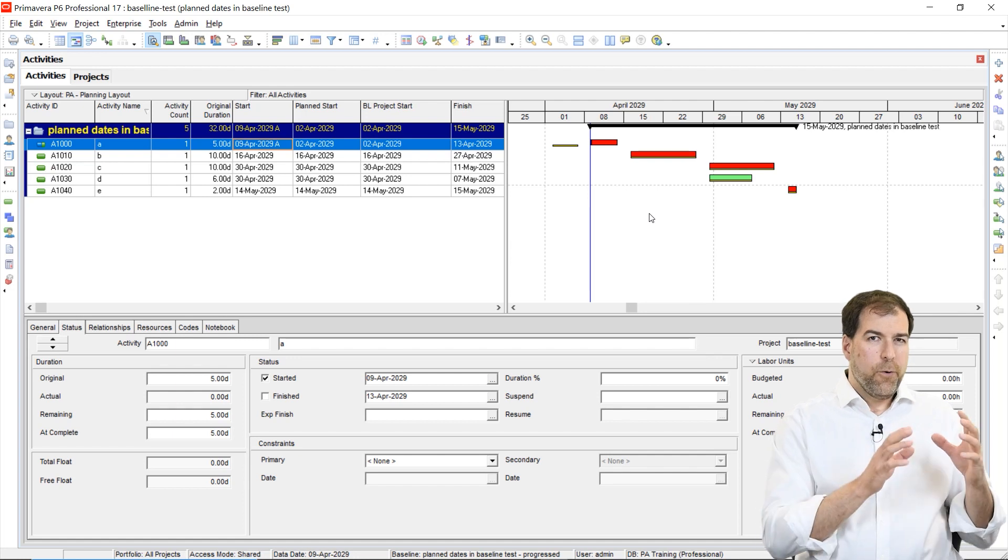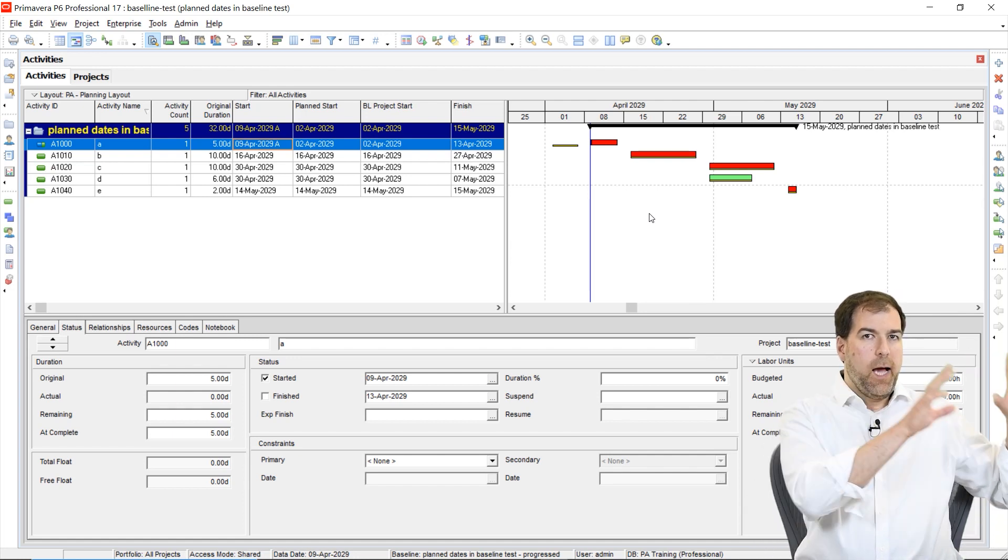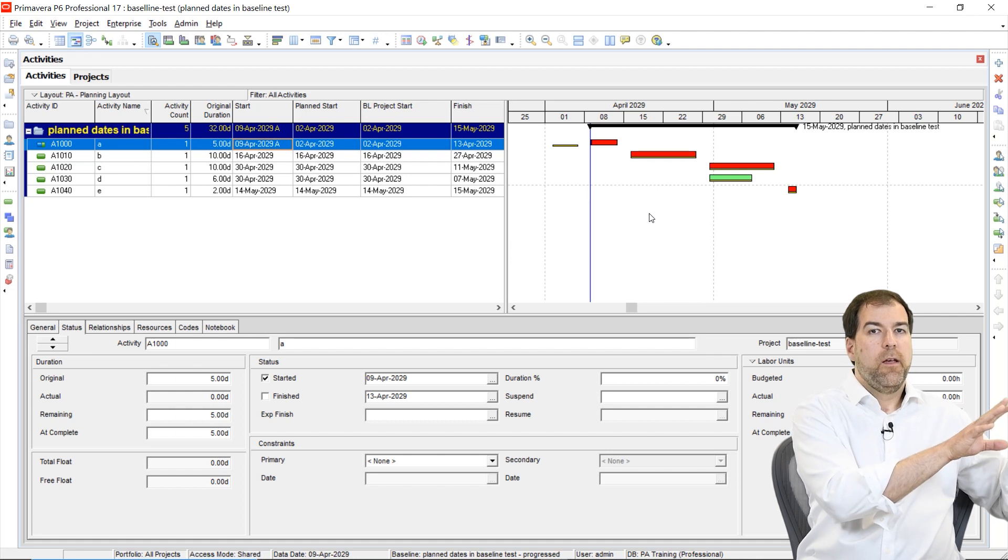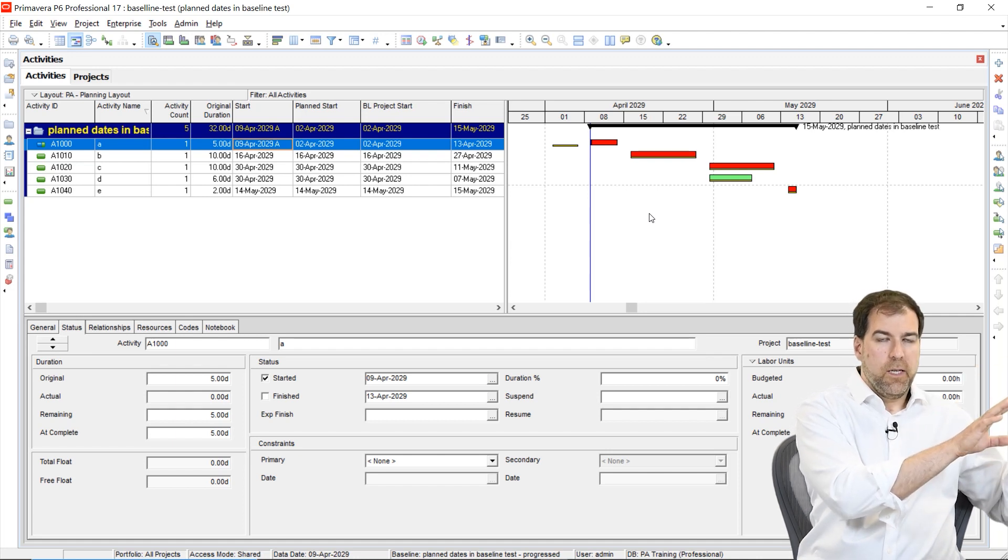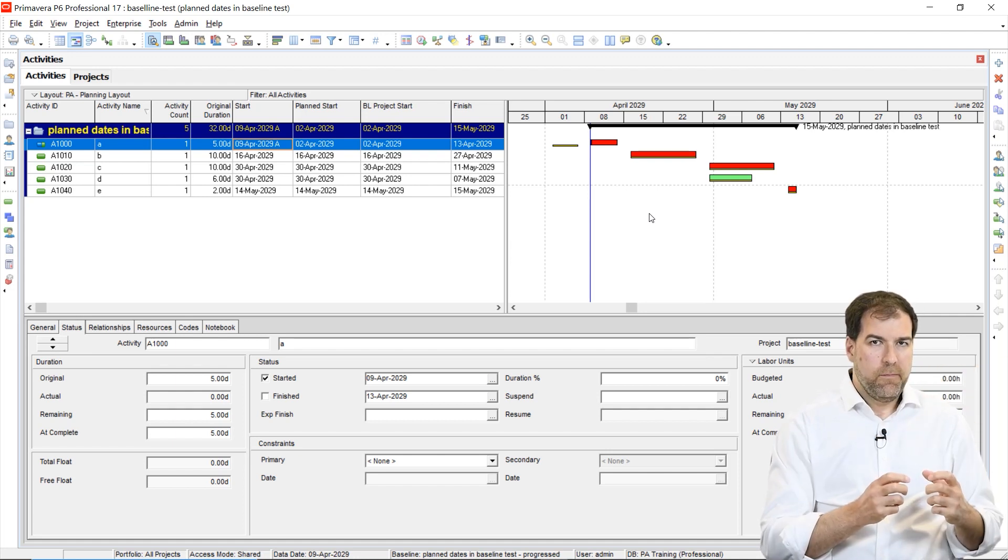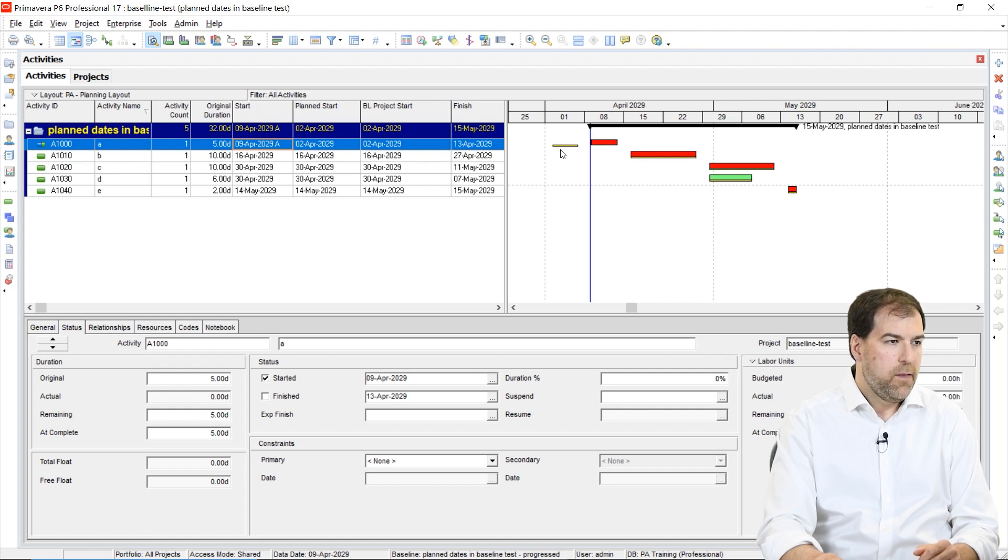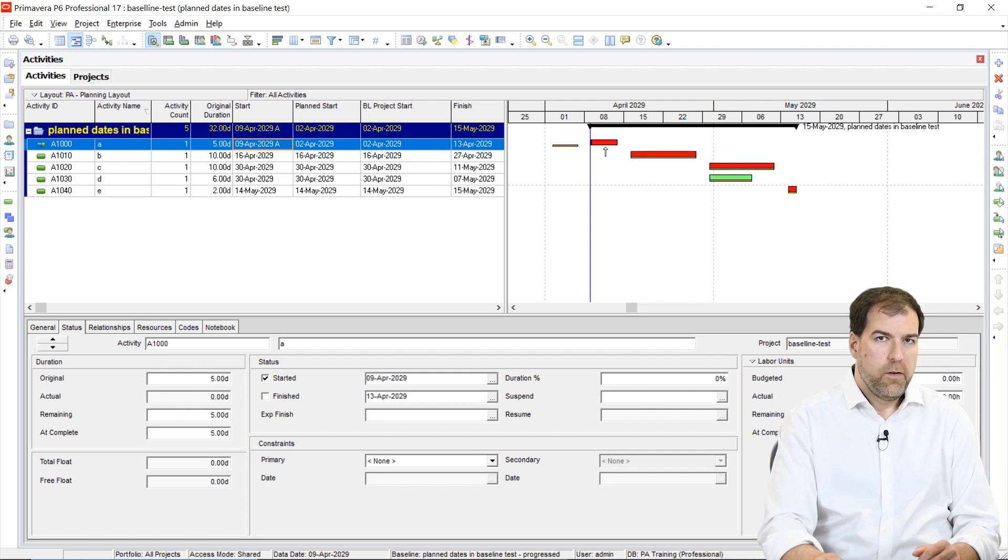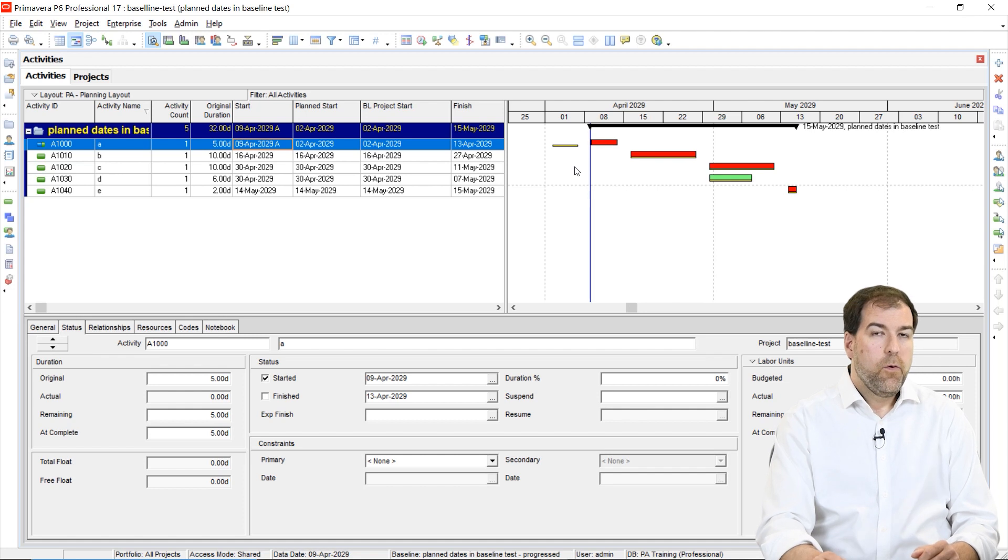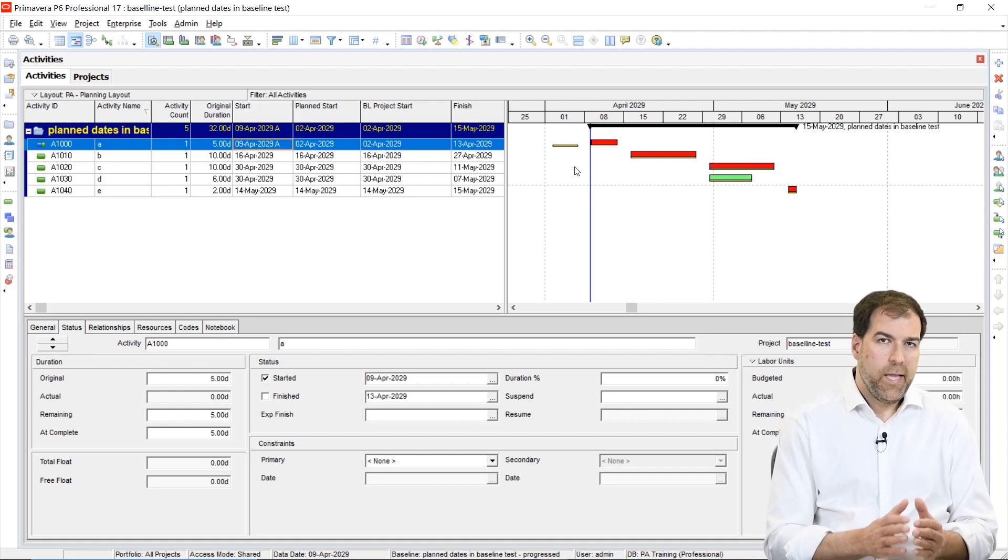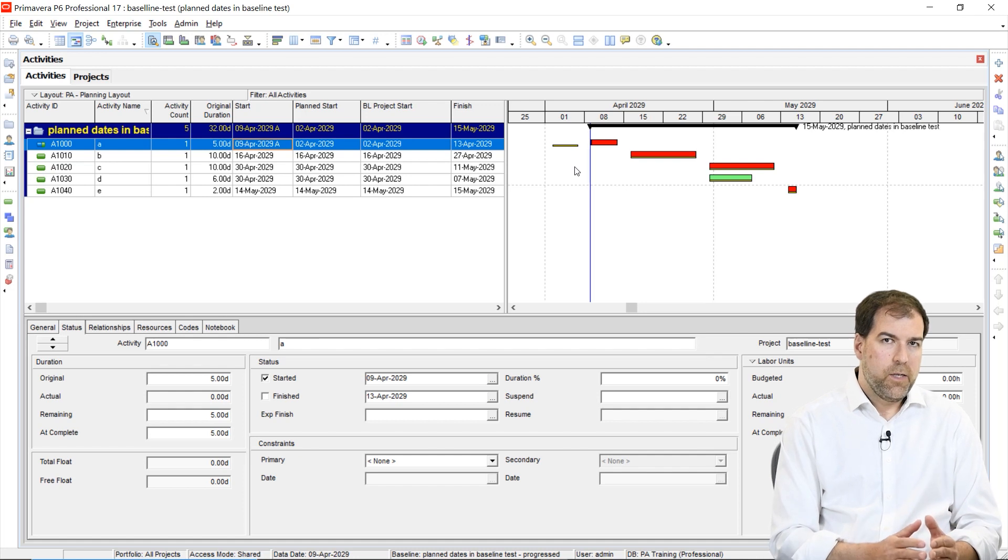I created a new baseline based on my schedule that was a week later. When I create a baseline, I expect P6 to capture the dates, take a snapshot of the dates as they are and store them in the baseline. But look at the activity number one here, my A1000 activity. Why did this baseline bar not move ahead to the week later, like all the other ones did? Well, this has to do with planned dates and the earned value setting that we're talking about.